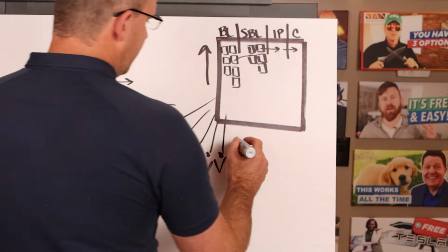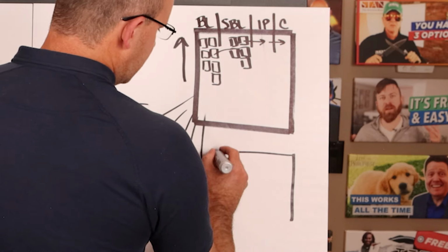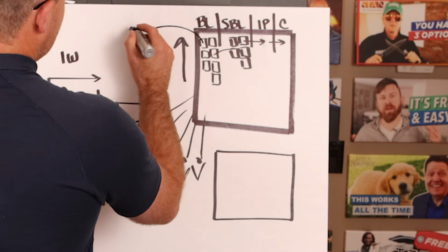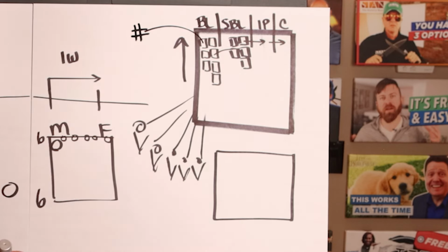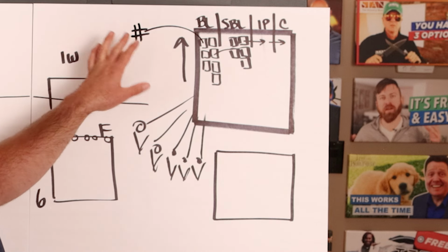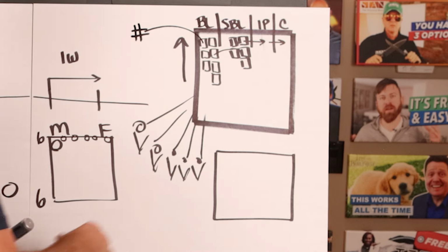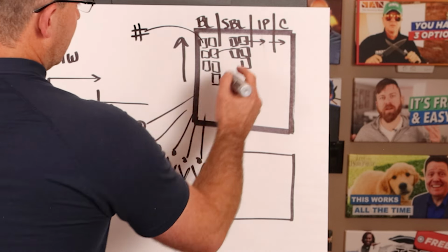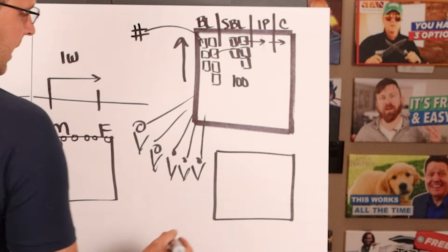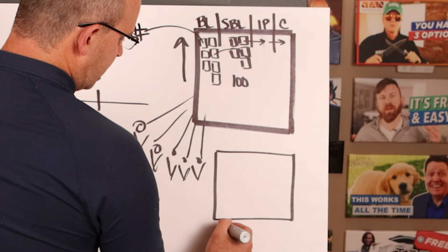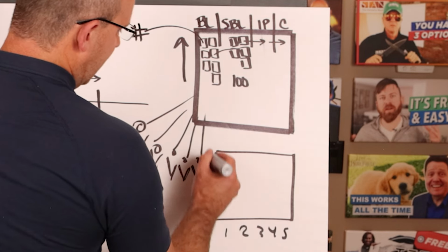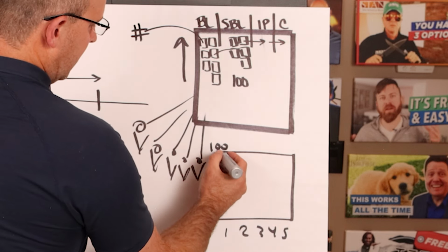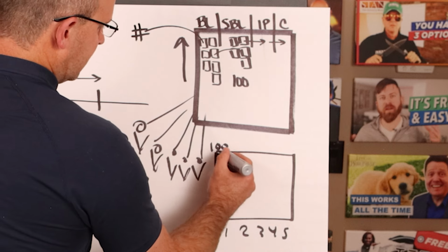Now, there's another tool. It's the burn down chart, right? So let's say that, and I don't want to get too complex here, but let's say that each of these stickies, each of these tasks had a number according to the Fibonacci scale that described the level of effort for that activity. And let's say that everything, and you can either do it for the backlog or for the sprint, let's say that there was 100 points here, right? And so you would put on your chart day 1, 2, 3, 4, 5, and you would put 100 points. So on day 1, if the team did 5, right? And they only did this much work.